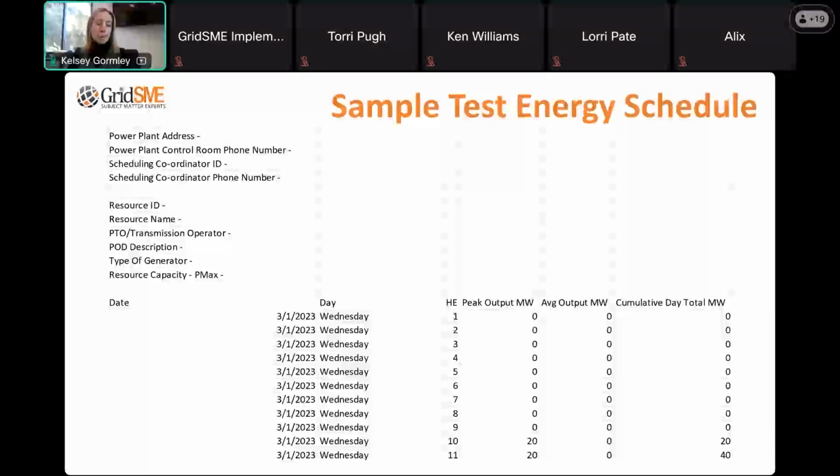It's important to keep in mind that if you are a resource that is in test energy only, you are not yet commercial, test energy is typically the first to be curtailed if CAISO needs to reduce congestion on the grid. It's also the first to be curtailed if you're a battery trying to take power off the grid during high need periods. So what does that mean for you?